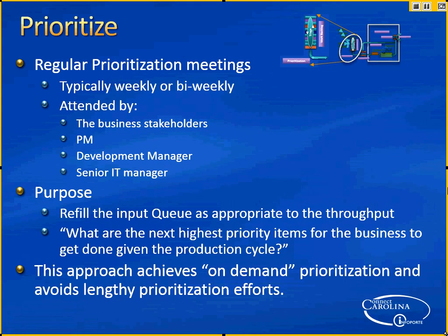Oh yeah, for sure. So those sorts of things have to be... There are relative priorities too, right? You could have a higher priority that you don't have any people to work on. It might require a certain developer or a type of resource, and you'd be better off picking the second prioritized item because you have people that work on that. Right. So you're using, again, judgment. Right.